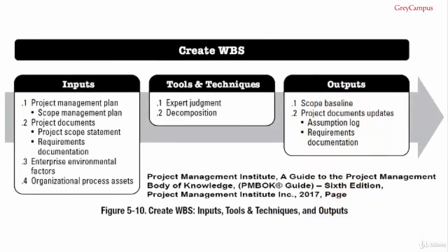Create work breakdown structure inputs. Input number 1, project management plan. A project management plan component we can use is a scope management plan, which documents how the work breakdown structure will be created from the project scope statement.